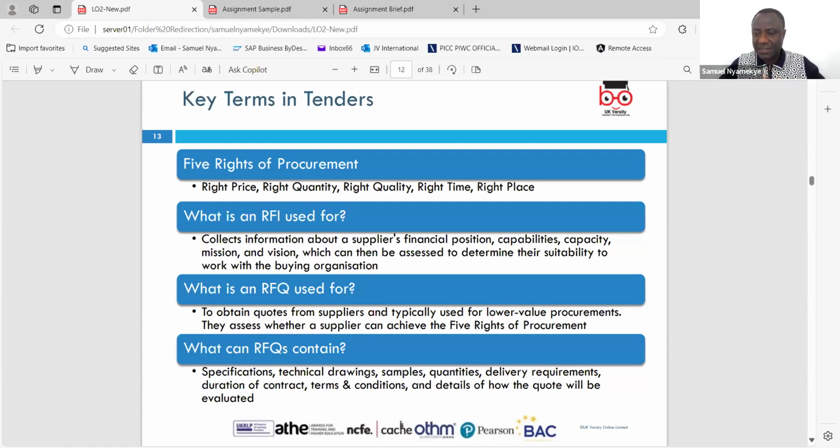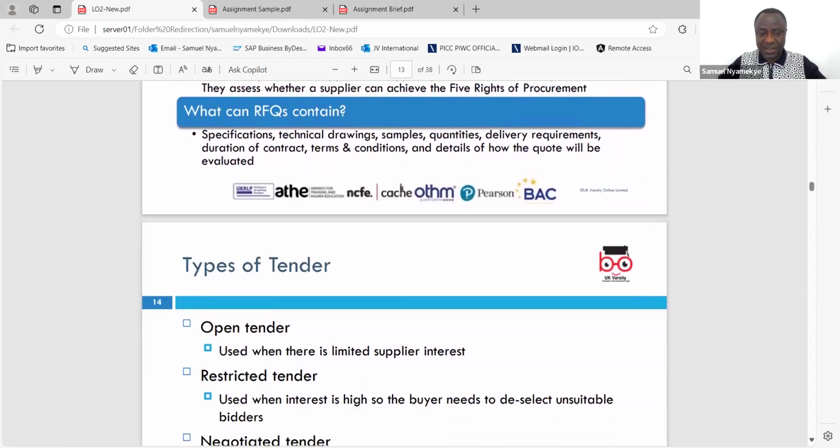We have the right to reject it and all that. So you have to make it clear, and give details of how the code should be. Then we'll tell you that the tender will be closed on this date, and 5 days from then there will be an evaluation. 20 days later there will be the declaration of those who are being shortlisted, and they'll be invited for further interviews and all that. So you have to make the timeline clear as to what you want to do. Then whoever is bidding is aware.